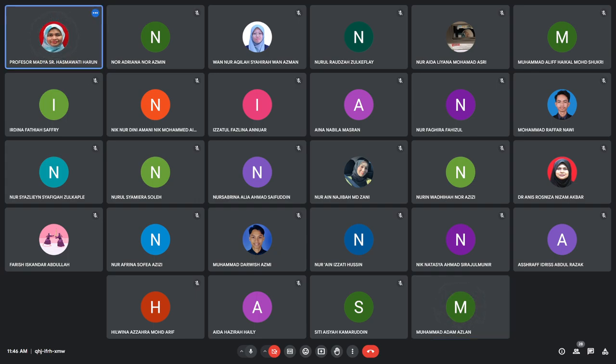50 to 100, okay? Subject to the category of project. Some projects don't have many samples. For example, a rare project with only 10 buildings, or sometimes 5 buildings and so on. So you get it from there. Okay, good. So in order to build the tender prices, you need to get samples of prices from the measured rates from various trades, from the various trades in the bills of quantity.